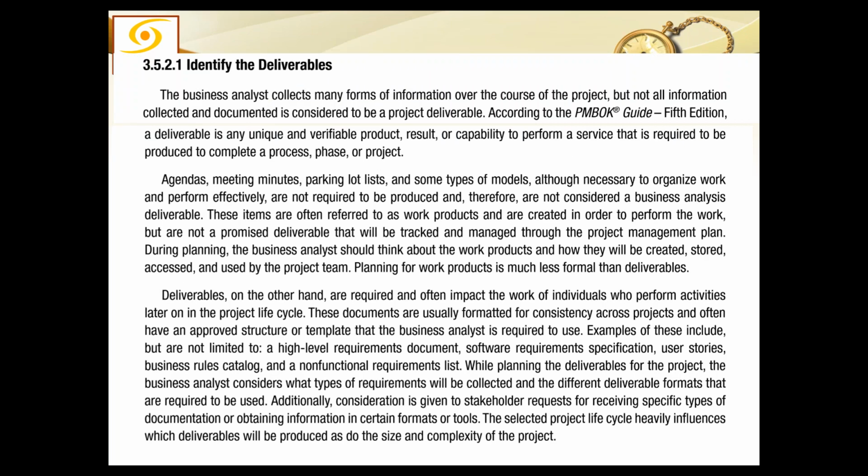So we identify the deliverables. The business analyst collects many forms of information over the course of the project, but not all information collected and documented is considered to be a project deliverable. PMBOK says a deliverable is any unique and verifiable product, result, or capability to perform a service that is required to be produced to complete a process, phase, or project. Agendas, meeting minutes, parking lot lists, and some types of models, although necessary to organize project work and perform effectively, are not required to be produced.